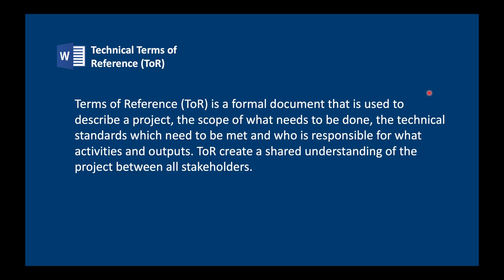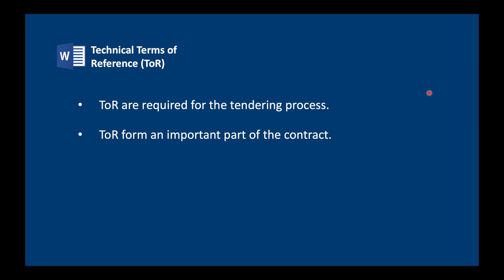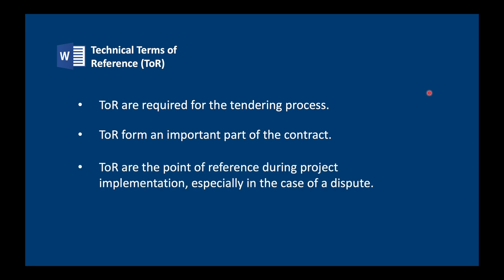Let's start with the technical terms of reference, otherwise known as TOR. TOR is a formal document used to describe a project, the scope of what needs to be done, the technical standards which need to be met, and who is responsible for what activities and outputs. TOR creates a shared understanding of the project between all stakeholders. They're very important both during the tendering process and during project implementation — especially as a point of reference if there is a dispute.